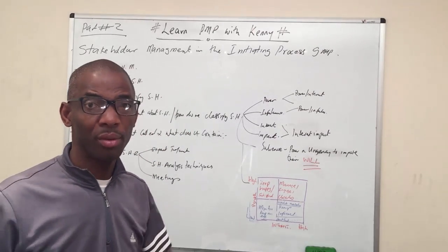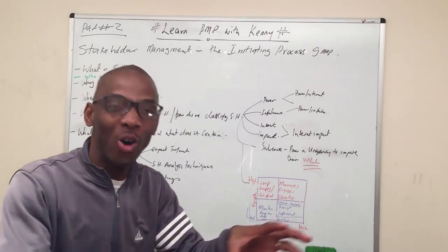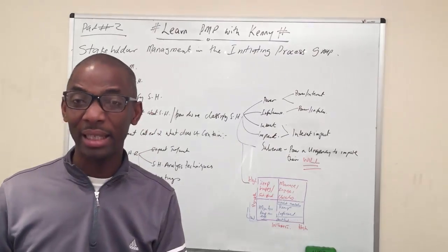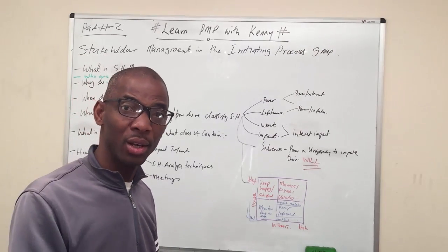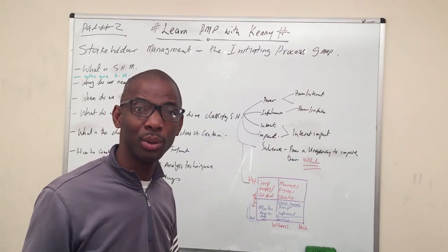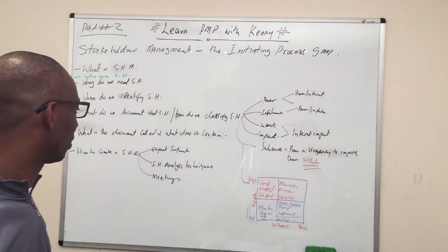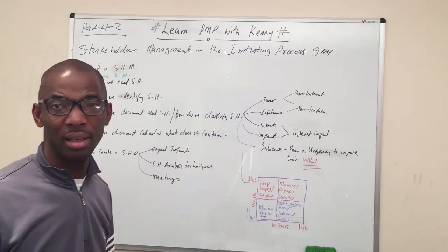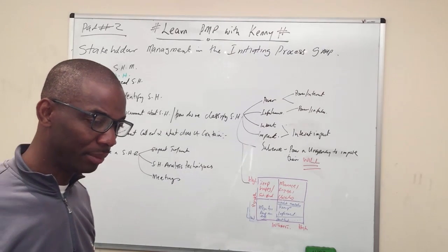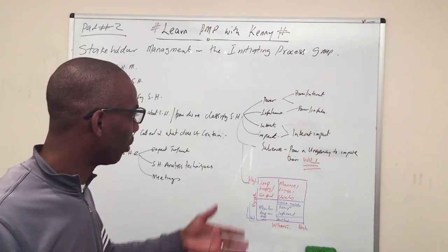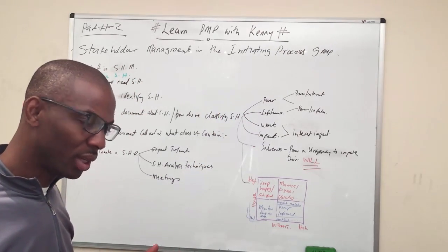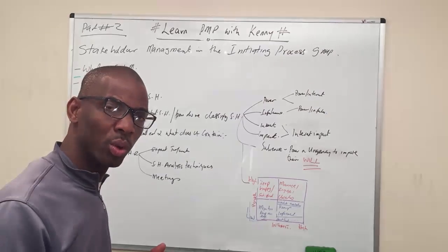Really, you're not doing it by yourself, but with a host of other people, such as people in your project team, the individual stakeholders themselves, your manager if you have one, and even the project sponsor, who could help you identify the list of stakeholders. And then you do an analysis of the stakeholders, which is called the stakeholder analysis. This is where you determine exactly the power, the influence, the interest, and the impact on the project. That way you can know at what point in time you want to engage them.